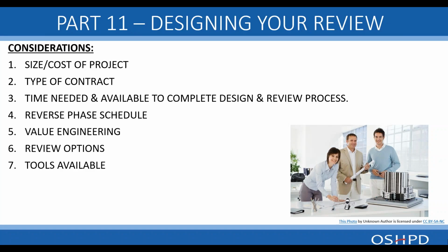This is session 6, which talks about designing your review and change management. So considerations in designing your review obviously start with the size and cost of the project, the type of contract you expect to have, considering IPD level 1, 2, 3, the time needed and available to complete the design and review process. It should look at the reverse phase schedule and consider value engineering.